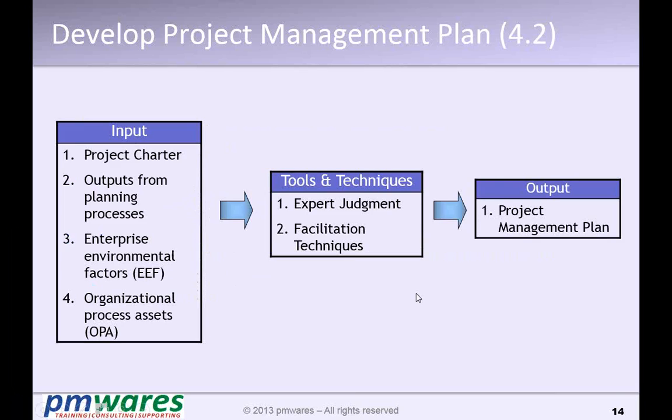What is the question here? Does the project charter define the resources allocated to the project? Not a RACI chart, it doesn't define. It is a part of human resource management. But yes, if some resources are already committed to this project, then they may be defined in the project charter, because those people could be critical for the project. In that case, it would be mentioned.